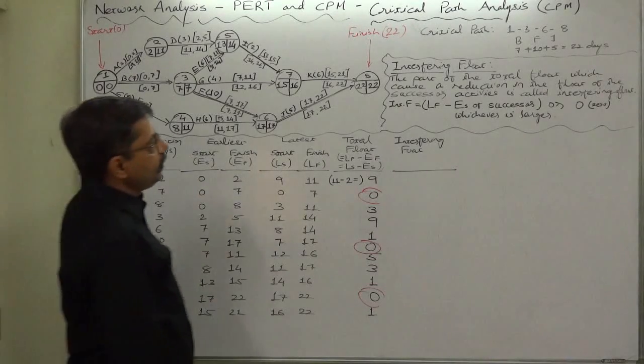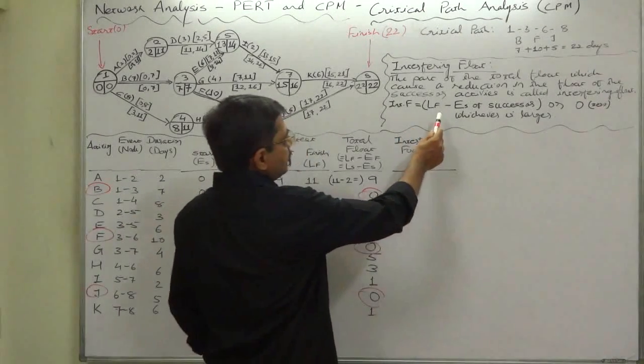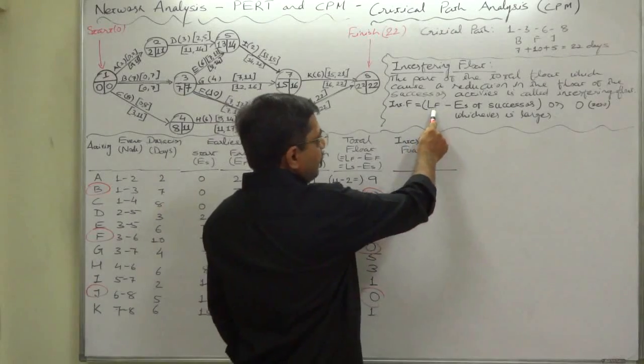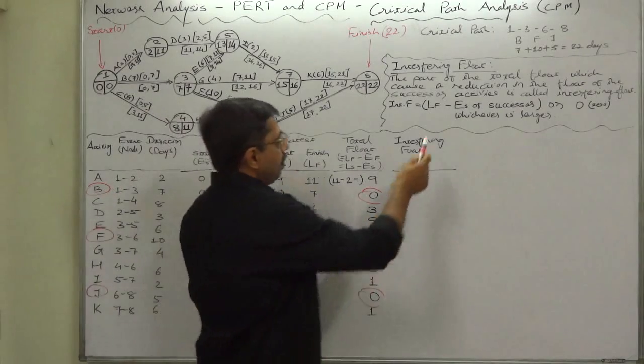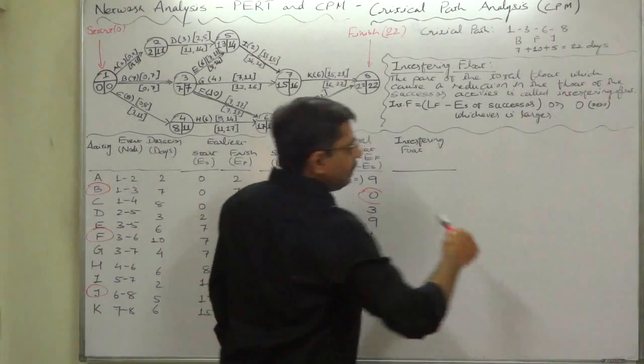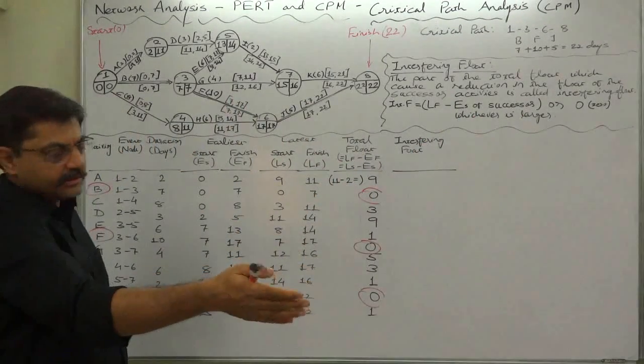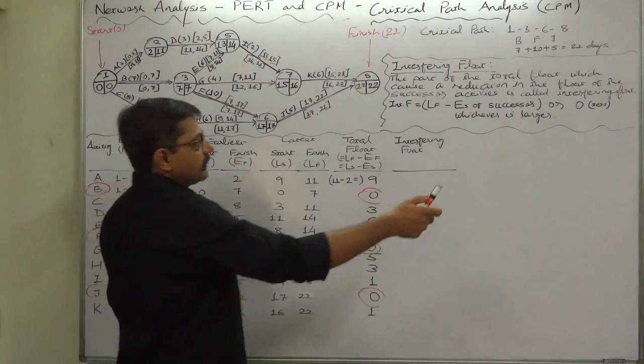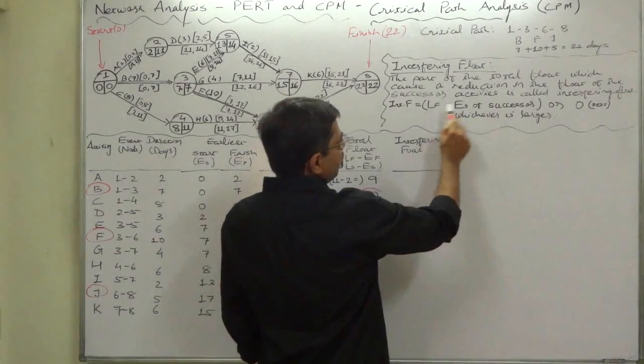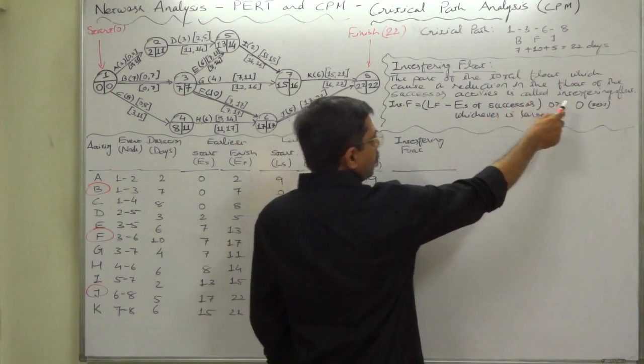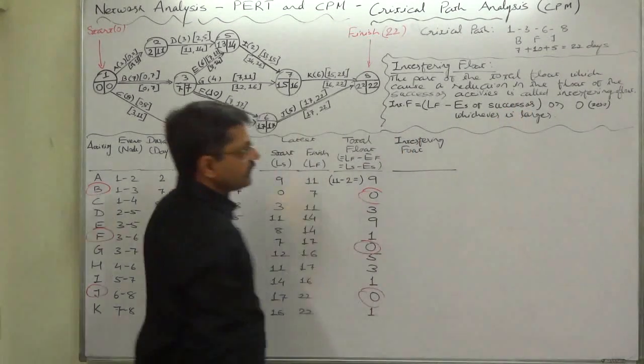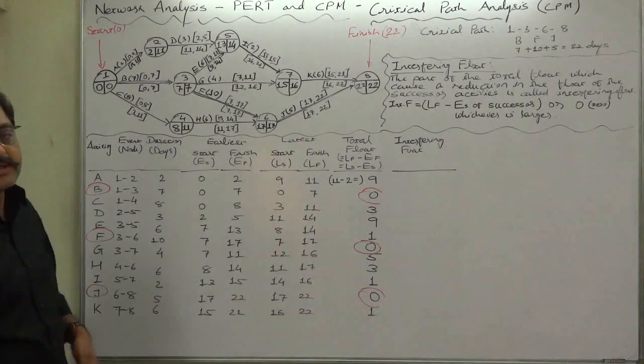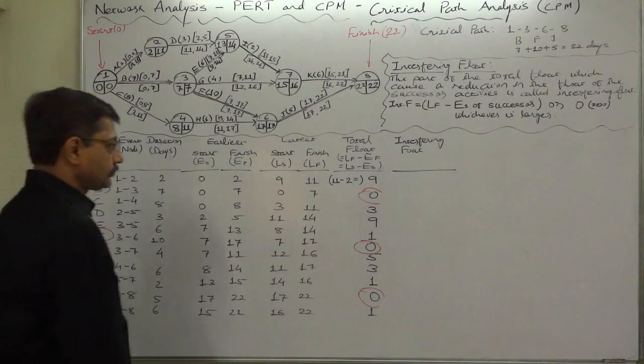The formula of interfering float is: latest finish time of the activity under consideration, the present activity, minus earliest start time of the successor activities. The difference between these two or zero - compare the difference with zero and select whichever is larger. That means it can never be negative.